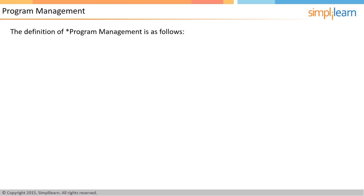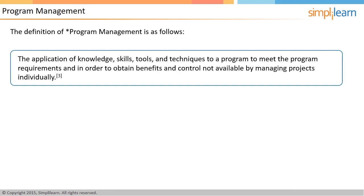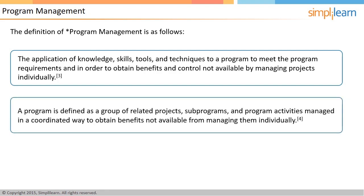Program management is defined as the application of knowledge, skills, tools, and techniques to a program to meet the program requirements and to obtain benefits and control not available by managing projects individually. As defined in the PMBOK guide, a program is a group of related projects which, when managed as a group in a coordinated fashion, provides benefits and control not available while managing them individually. These benefits could be from decreased risk, economies of scale, improved management of dependencies, delivery of additional capabilities, and optimal utilization of shared resources.